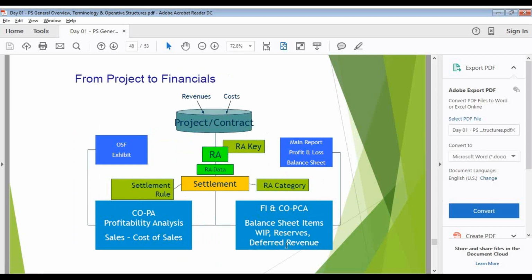Even the project systems guys will be monitoring these points. Whenever they have a surplus revenue, it is not a positive one, it is a negative one in the near future. This is how we have to study the RA reports. Where exactly we are standing, why we are getting surplus revenue excessively in consecutive months, why we have deferred revenues, why we are not billing the customers, and why there is work in progress, why it is not billed to the customer.